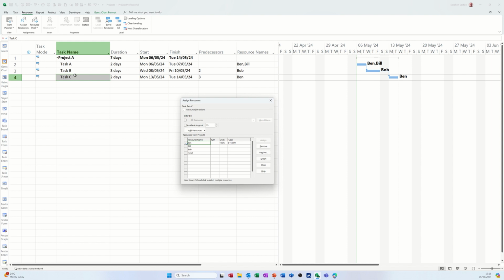They're not. So on task C also, let's go for a hotel. So this is how you assign this. You assign it and then you allocate a cost to it. So I'm going to type £100 cheap hotel. That's assigned to that. You can see it there.